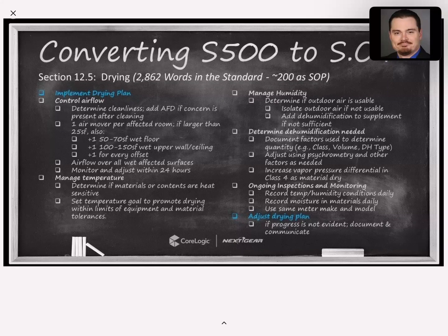When we back up and review the process, step number one, right, is to just identify the key trigger words, the word should being that most important term that you're going to look for in the standard. Pulling out just those phrases, those should phrases, and from those should phrases, developing your checklist. What are the items that must be completed?